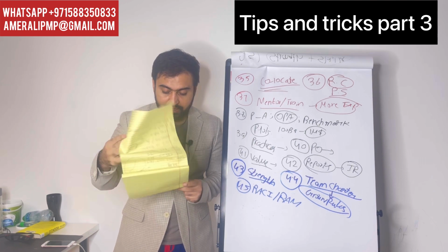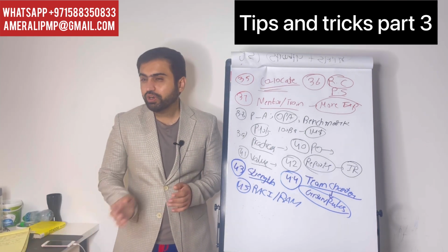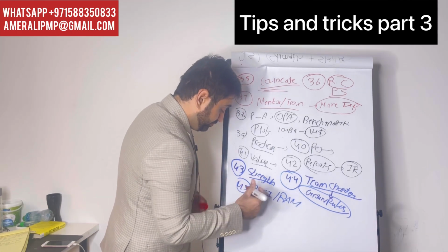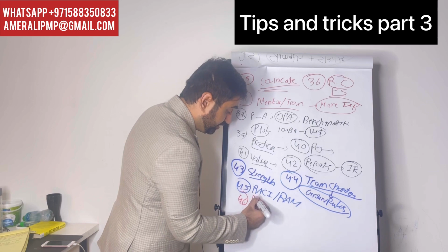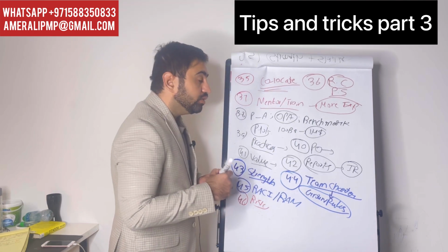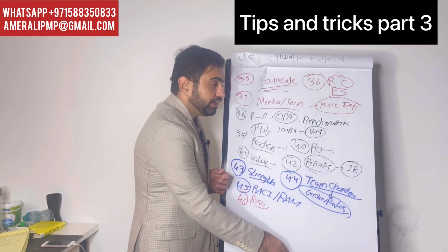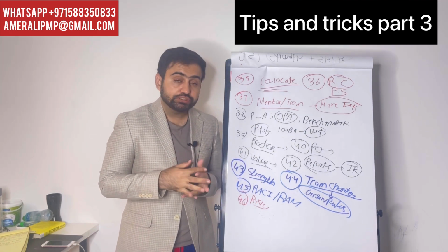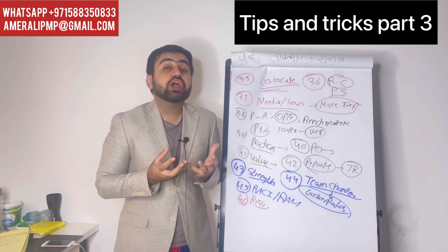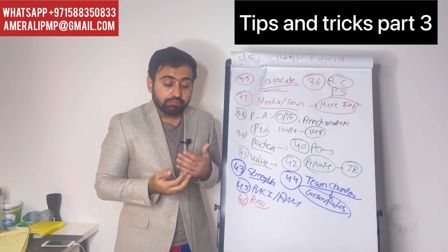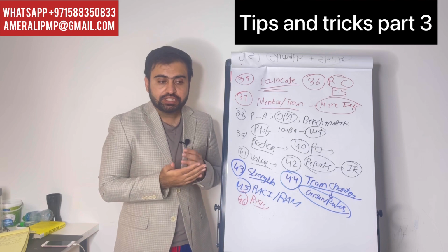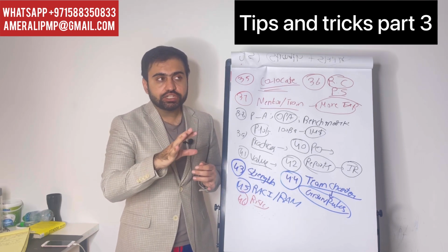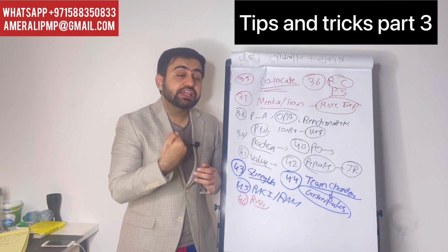Okay, another thing I want to talk about is in risk. I'll add one more. In the risk response strategies, you see avoid, mitigate, transfer for negative risk, and exploit, enhance, share for positive opportunity. These are proactive response strategies, meaning you handle these risks before the trigger even happens. Whereas acceptance is where you say, okay, let this risk happen and then we will deal with it.